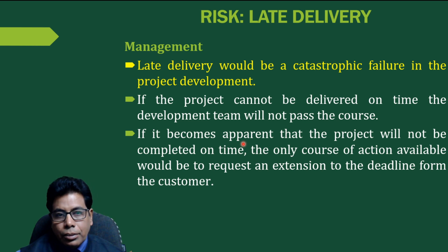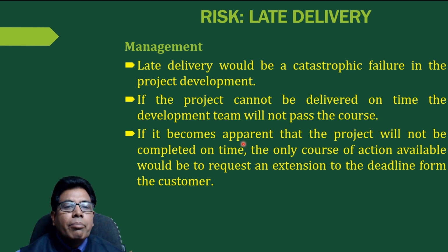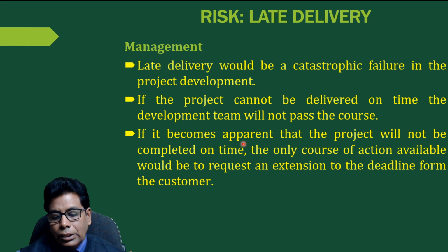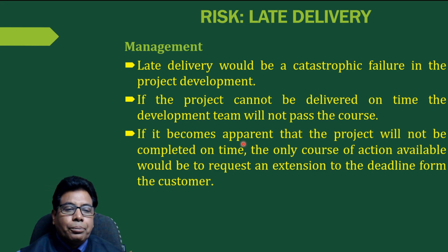So this is a catastrophic failure in the project development, and the development team will be affected. In order to avoid it, we can request an extension of the deadline from the customer, and if the customer agrees, the deadline is extended. That is the management part for this risk.